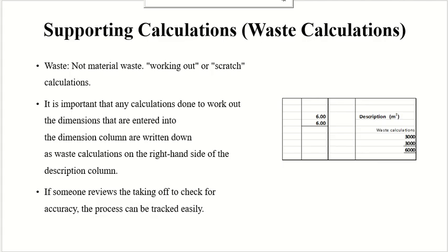Now, for construction waste, we don't do any calculations by the way. If there is any waste material on the construction site, we don't do calculations for that. We just take it as a percentage, 10%, 20% will be wasted. This waste calculation means where you are getting the quantities which you are writing in the dimensions.